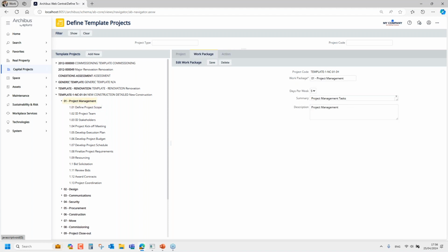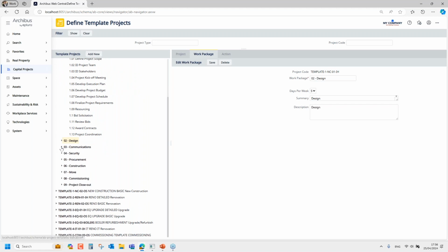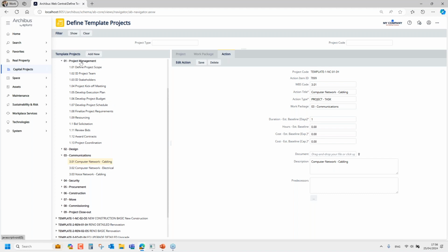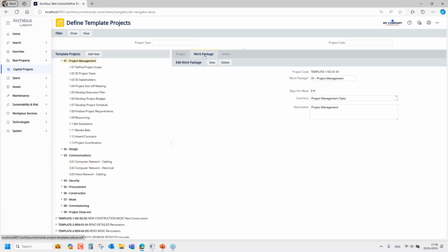Basically the packages are just subsets of each project that you normally keep track of, and you want to be invoicing or maybe even bidding out separately to different contractors. So the work package is a way of creating bids for contractors so they can bid on, and ultimately the contractor bids that you award will become the contracts.